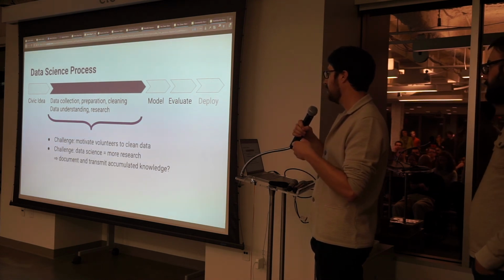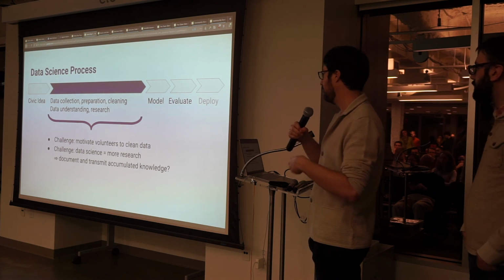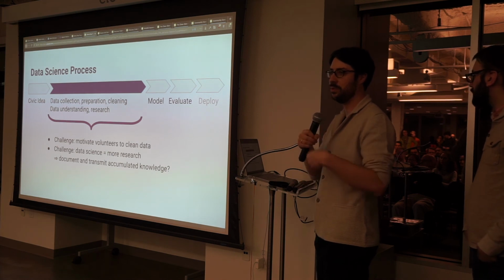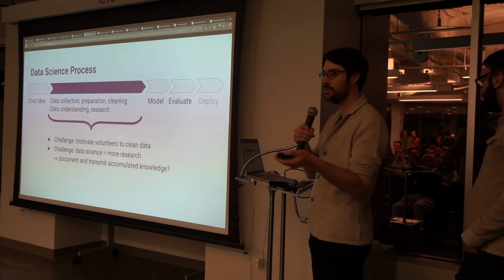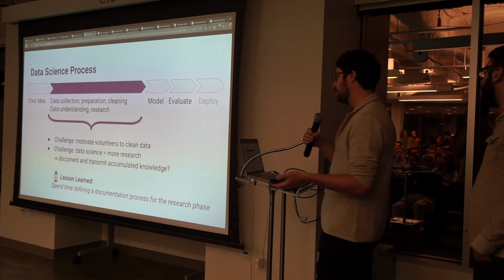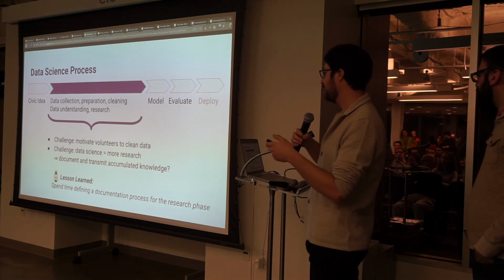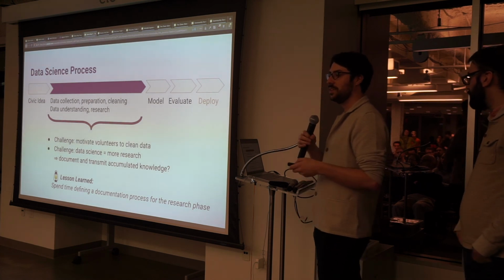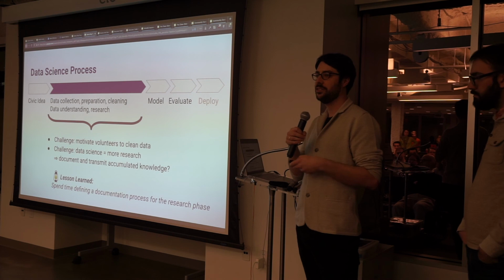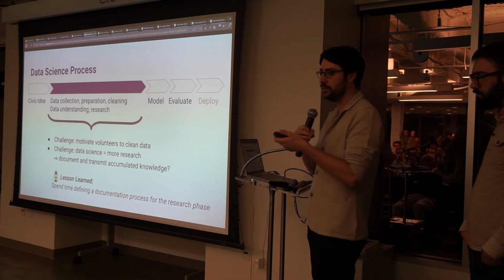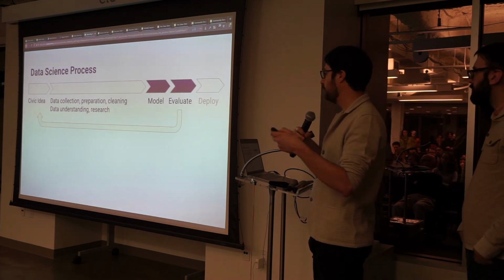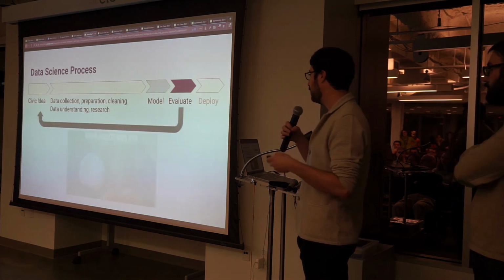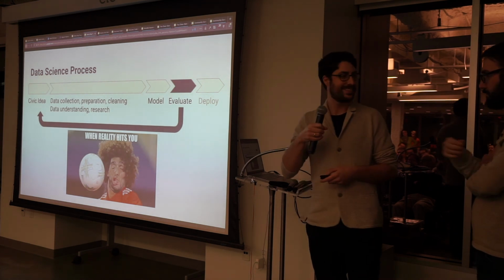And there, it was a challenge for us to document and transmit this accumulated knowledge, especially at Code for Boston, which is volunteer-based, and the volunteers come and go. And that's one of our lessons learned, to spend more time defining this documentation process for the research phase, especially because the traditional tools and processes in software development are not always useful. So after all this time, you can try several models and evaluate them, and that's when reality hits.